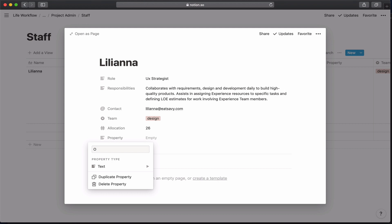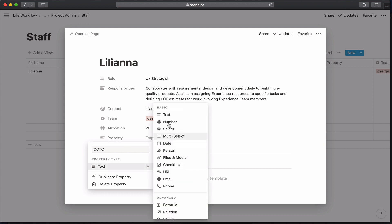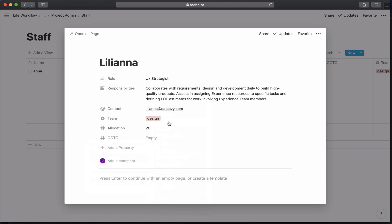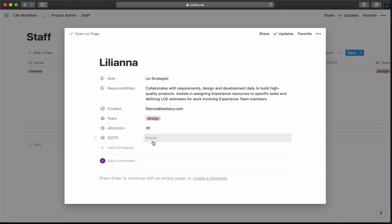The other property I'm going to add here is out of office. And usually this should just be blank. So allocations is going to be pretty steady. Our allocations shouldn't change much. They might change over the course of the project, but they shouldn't change between sprints. But out of office, as we go into sprint planning, the first thing we want to do is how many hours is somebody going to be away? If they're on vacation, they're not going to be able to do their full allocation, and we're going to want to know that.